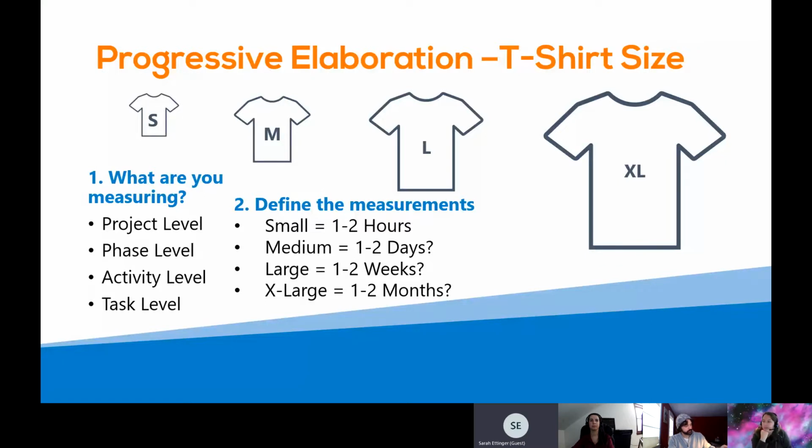Okay. Yep. And the measurements, this is just an example, but the measurements you define either with your team or what that looks like. So if you're talking about a task level, then maybe you are talking in terms of effort versus duration. In most cases, I use the t-shirt size method in a duration format versus an effort format. Small, medium, large, instinctual, duration.